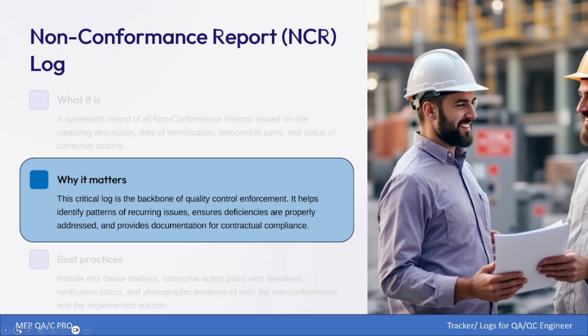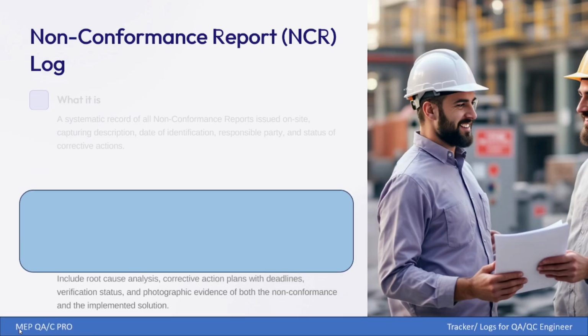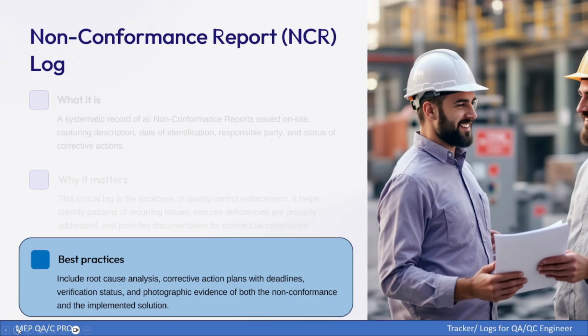So from there you can understand the best practice. The best practice is root cause analysis, corrective action plans with deadlines, verification status, photographic evidence of the non-conformance, and the implemented solution. As I told you, you need to identify the root cause analysis and mention it in your tracker for each specific NCR.